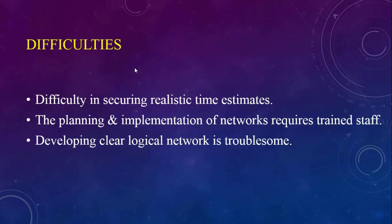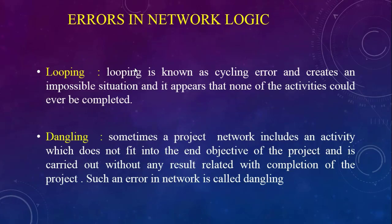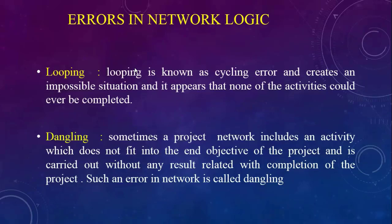Errors in network analysis include looping and dangling. Looping, known as a cycling error, creates an impossible situation where none of the activities can be completed — the network has a start and end but sometimes it is not possible to complete the project, which is called a looping error. Dangling occurs when a project network includes an activity that does not fit into the end objective of the project and is carried out without results related to project completion. Such errors also occur in network logic.